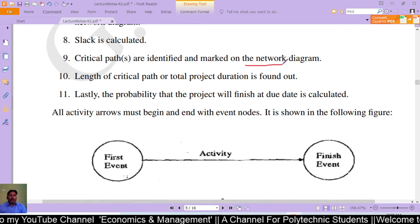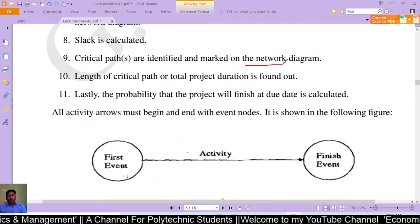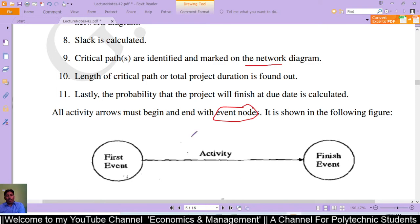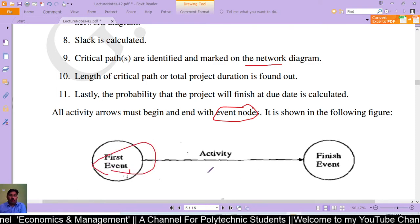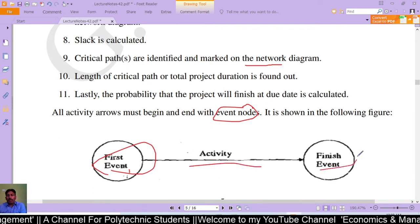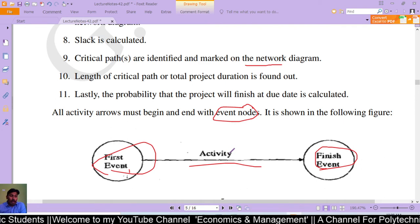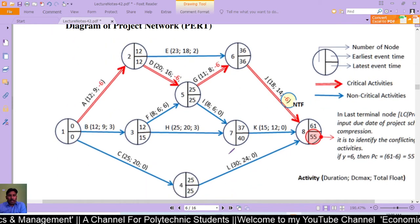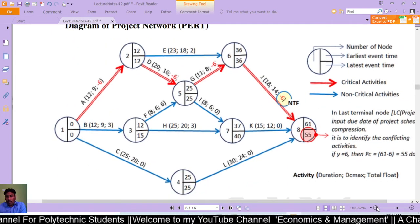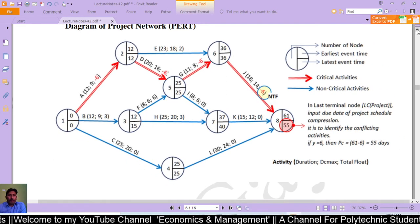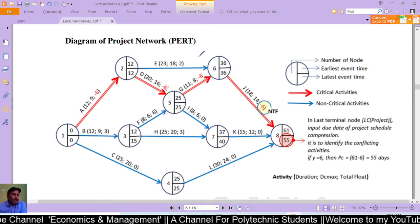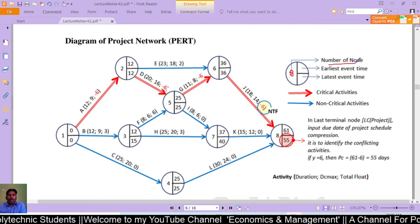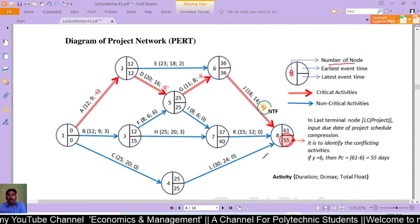All activities and arrows must begin and end with an event node. As shown in the figure, we have the first event node — the start — and this is the finish event, representing the starting and ending of the project network.